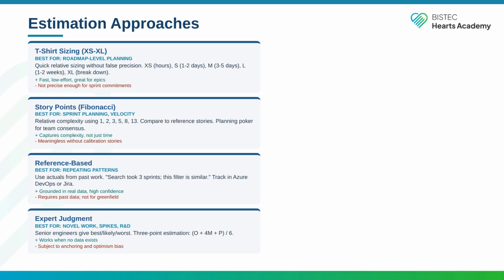Story points capture complexity, not just time. An 8-point story is not necessarily 8 days of work. It represents an 8-point level of complexity relative to your baseline. But story points are meaningless without those calibration stories to anchor them.